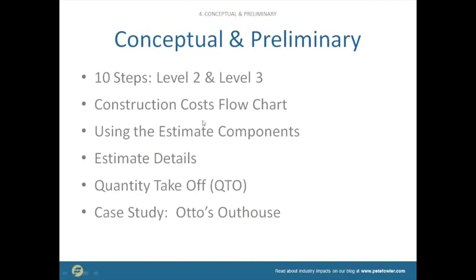Let's see, construction cost flow chart. We just went through that construction cost flow chart, by the way, using the estimate components and estimating details. I showed you all of this. Quantity takeoff is when you literally sit with a set of plans, or you're out on a site measuring things and figuring out what the quantities are.